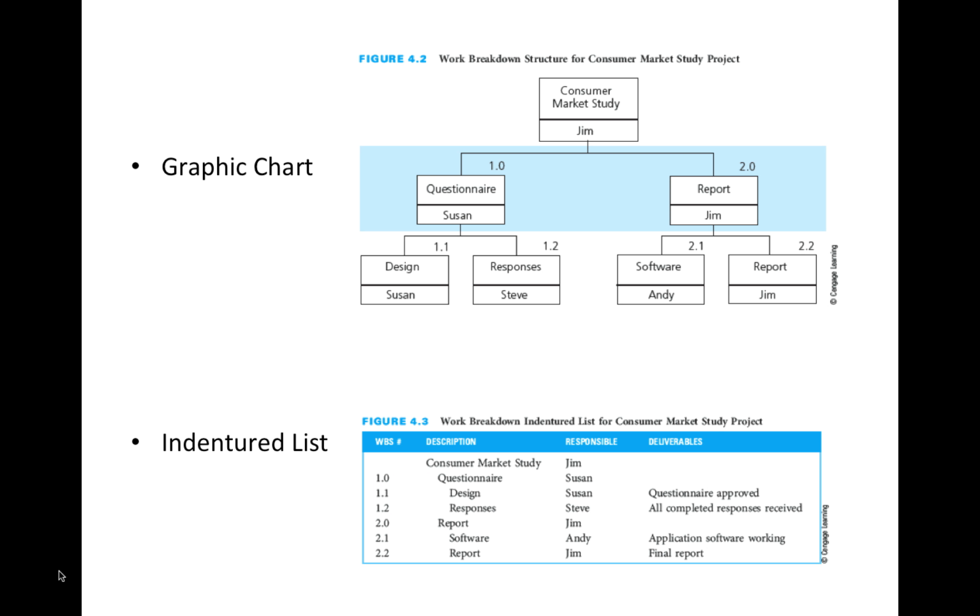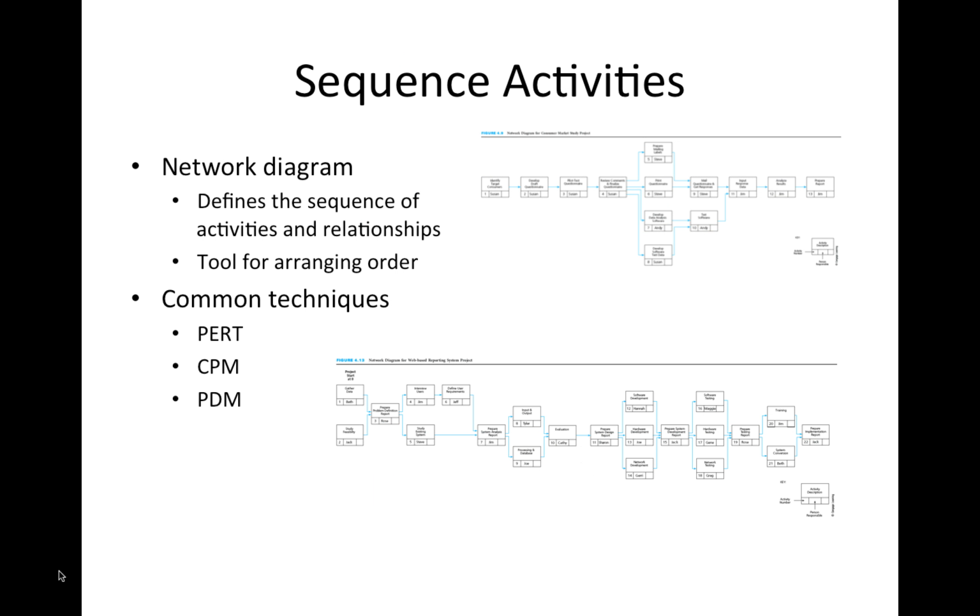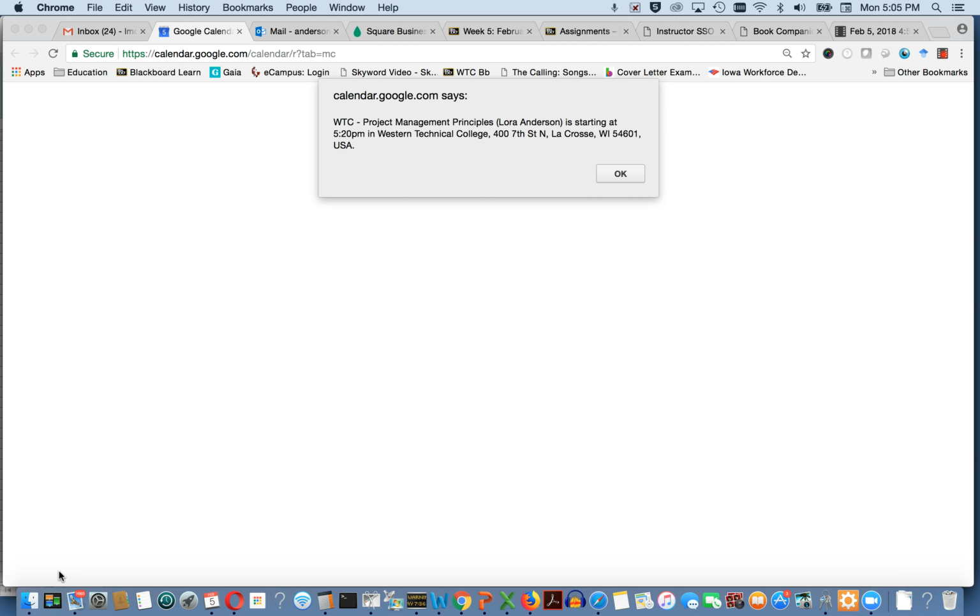Again, the next phase is to create that network diagram. Your network diagram is drawing up those activities for the project, showing them as boxes in their logical sequence, and connecting them by arrows to indicate the required dependent relationships as the project should be performed from start to completion. There are three types of questions you need to ask yourself for each activity.